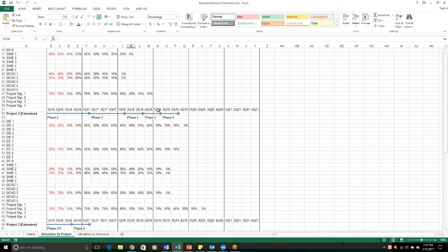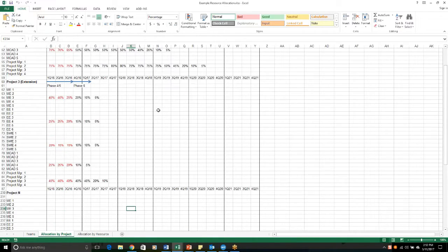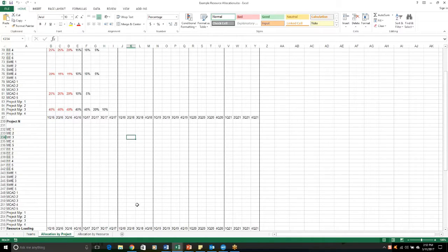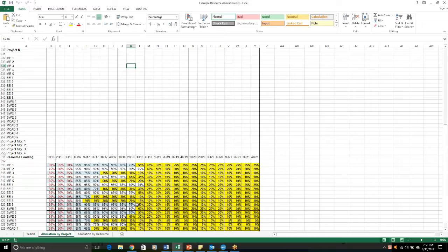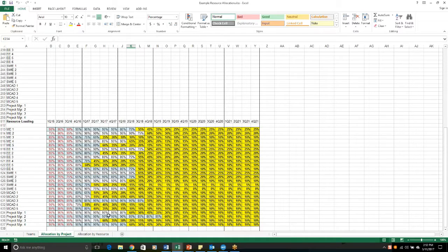So you've got existing projects that all lay into this spreadsheet, and then you've got, of course, sections where you can layer in new projects and start looking at the effect. If you just consider the existing projects right now, this gives the engineering manager an idea, illustrated in yellow here, of where the resources are going to start to become available, so that you can line those up with these project teams for the new priorities and come up with a plan to accommodate the project priorities in concert with the resource allocation.